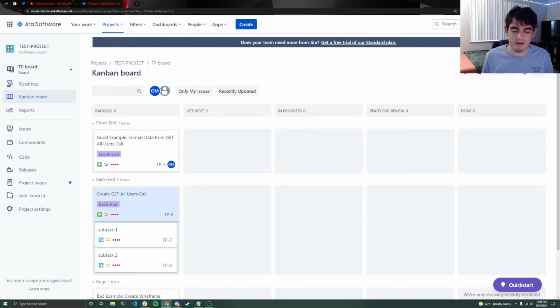It kind of demotivates developers when they realize, oh, I have this one task, it's going to take me like 10 hours. Oh man, that really demotivates people. So what we like to do when we create user stories, there's two things. The first is that stories should not have multiple pieces of functionality lumped into them. Each user story should really just represent one specific small task. And that transitions me into the second part, which is small. We should not be giving people big tasks.